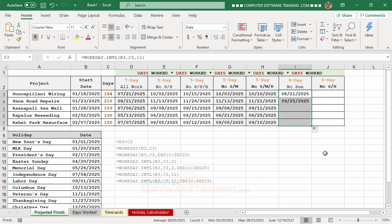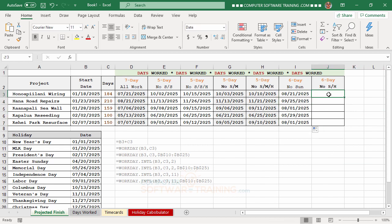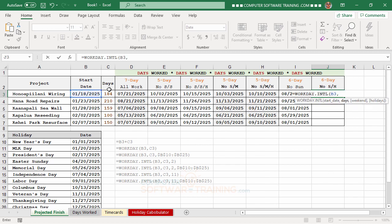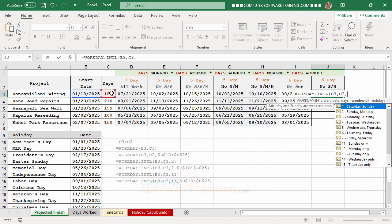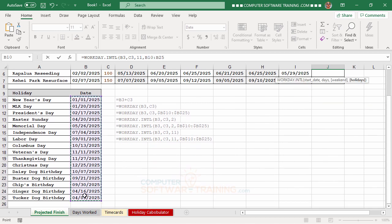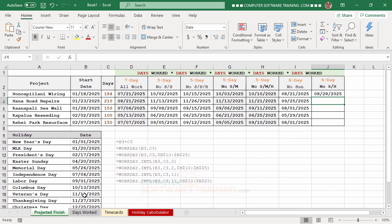The last WORKDAY column also skips holidays in addition to Sundays. The formula follows the same pattern: equal, WORKDAY.INTL, start date, comma, number of days, comma, 11 for Sunday-only, comma, then select the holiday range, press F4 to make it absolute, press Enter, and copy down.